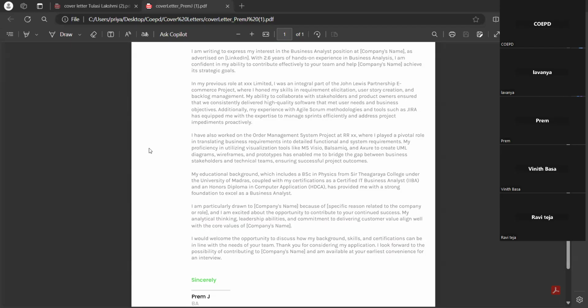Another challenge I faced was lack of stakeholder involvement, because that leads to delays in decision making and progress. To address this, we implemented regular update meetings and created a stakeholder committee that meets bi-weekly. This ensured stakeholders were consistently informed and engaged, helping us make timely decisions and keep the project on track.